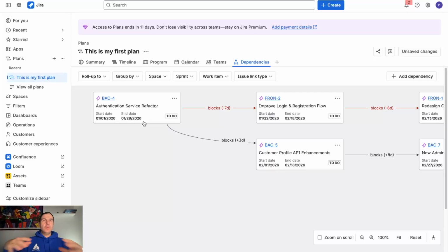So this is a great way for teams to manage dependencies, right? They can plan their work on their epic, they can plan their work on their project and say, here's what we are planning to do, and link all the dependencies, and then Jira Plans gives you this high level view and says, okay, everybody has planned, let's see how the master plan will work. Maybe it won't work well because there are some dependencies that you can foresee that are gonna be a problem.